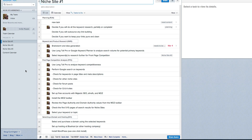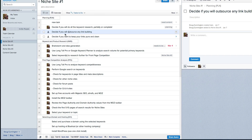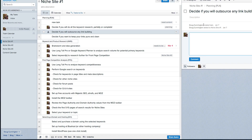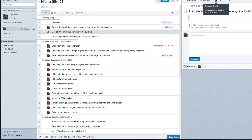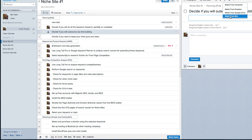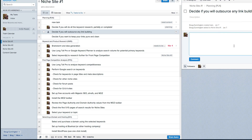What Asana does — and Basecamp too — is bring those two areas together so you end up with one tool where you have a task and all the communications that are related to it. For example, if we go to a task here, you can have comments, a description, due dates, an owner, subtasks, a tag, and attachments from Dropbox, Google Drive, Box, or even from your machine. It really just makes it much easier to track a project in a task-based manner, outside of an email inbox.